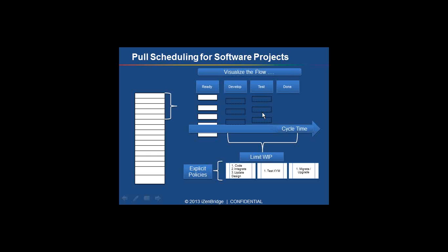The other thing you have to do is, at each stage you need to fix WIP limits. What does it mean? Work in progress limits. It can be visualized like this: if you go for a car service, at various stages the servicing company has limited infrastructure. For example, at a given point in time only 10 cars can be washed, only 5 cars can be checked for wheel alignment. If you have more cars, you need to wait. And if they don't have the capacity to serve, they may stop taking new cars for service.